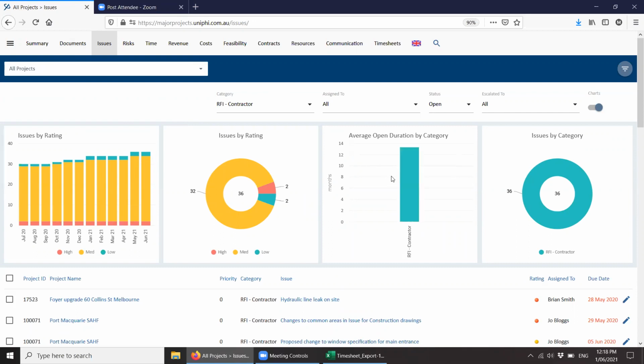If you have standard service levels that you need to perform on contracts, you can track that through these visualizations on how quickly you're turning around RFIs. On a presentation database that's been used for many years, we have a rather horrendously large 13 months to tell a contractor a response once they've asked us a question.